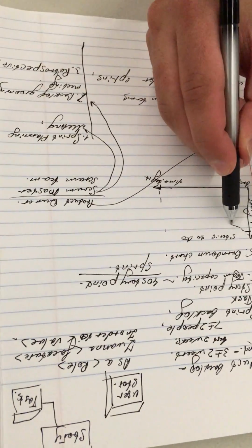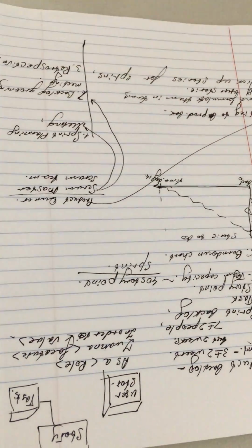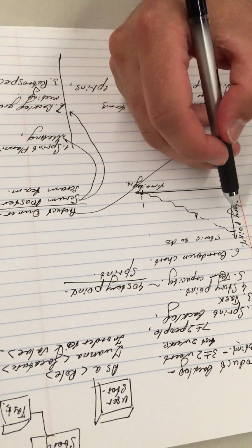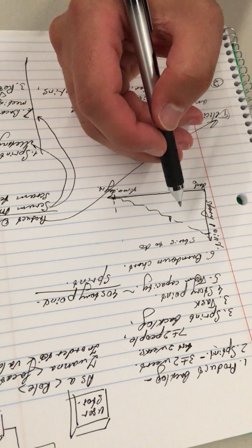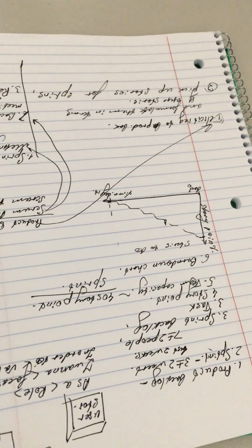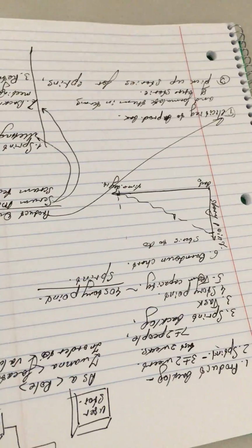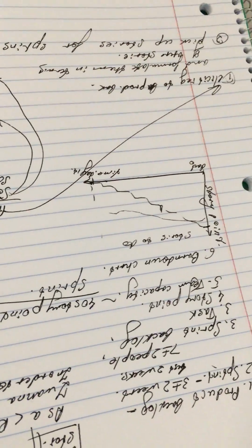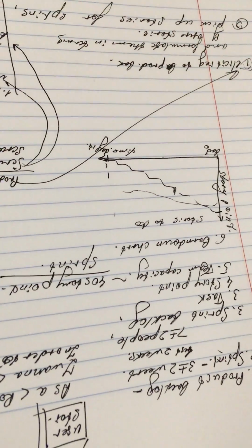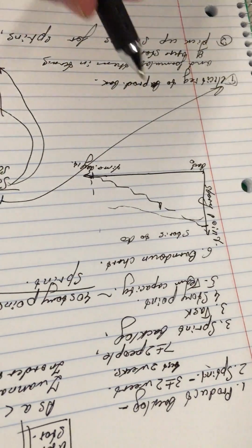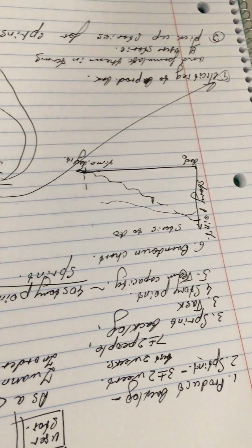Yes. And this burn down is gonna go down. It's gonna go this way. So at this point in time, let's say half of our stories are behind us, and half of them are still to do. But it could be another way around. It could look like that. So what does it mean? We're about to complete the sprint, but it looks like half of the stories are still not done. Something is wrong. It's really wrong, but we cannot prolong the sprint. So we're gonna take them out.